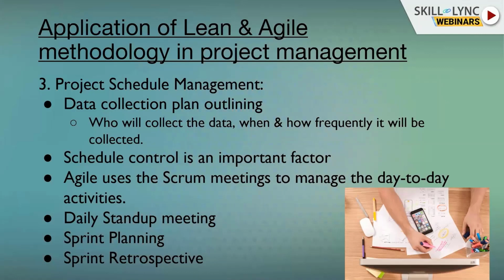Sprint retrospective is a short-term meeting, usually of 1 hour duration, which helps to find what activities and things in the sprint are doing well, what activities should be continued, and what more can be done to improve the next sprint to be more effective, efficient, and productive. Now, moving forward,